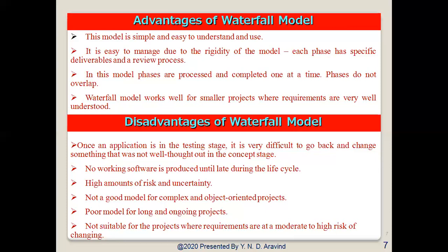We can say that these problems are often not discovered until system testing. Until all the phases are completed and we do testing, we cannot identify the problems. That is the major disadvantage. For big projects, or projects which are more complicated or high-risk, we cannot use this method.